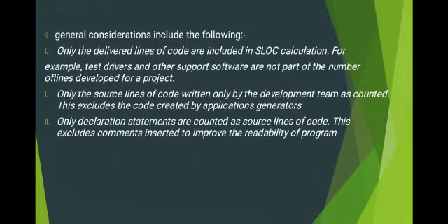The general considerations in the LOC technique include the following things. First, only the delivered lines of code are included in a LOC calculation. For example, test drivers and the support software are not part of the number of lines developed for the project.